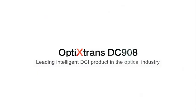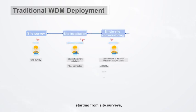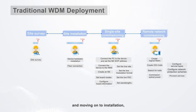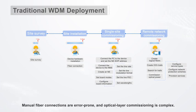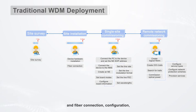In traditional WDM deployment, more than 10 steps need to be performed, starting from site surveys and moving on to installation, single-site commissioning, and remote commissioning. Manual fiber connections are error-prone and optical layer commissioning is complex. Sites require multiple visits from several professional transmission engineers, and fiber connection, configuration, and commissioning carry a heavy workload, imposing high requirements on technical skills.